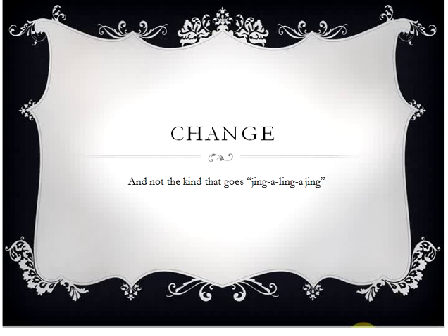So we need to make sure we can offer the education in 10 weeks to allow schedules to be open and available for education so nurses can schedule their education. So right now we're looking at 16 weeks before go live. That's the type of communication that needs to go out so the expectation is set.